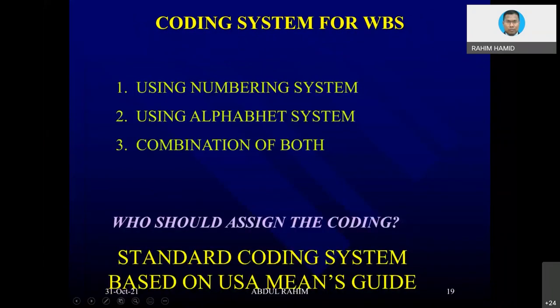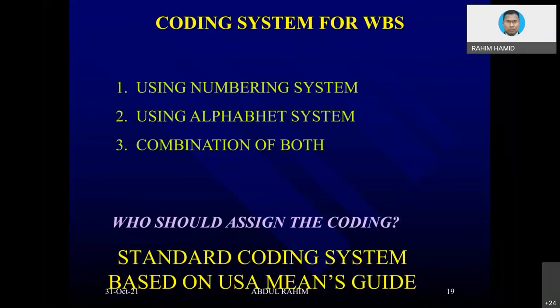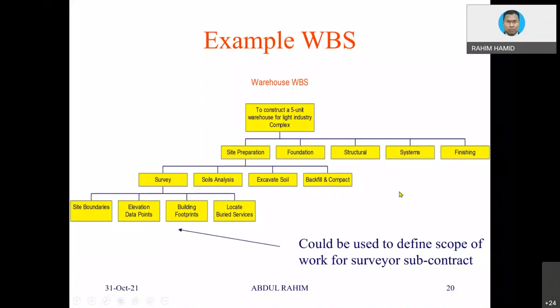The coding system for WBS uses numbering, alphabets, or a combination of both. The US MEANS guide is a book that contains those codes plus productivity rates. In Malaysia, I have not seen any similar book, so when we do scheduling it is difficult because we do not have a single reference guide. For BQ we already have a standard method of measurement, but for scheduling we are yet to see one.